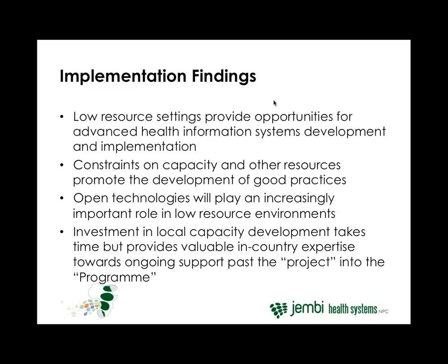And that takes me to my next point, which is investment in local capacity, particularly in the development and the requirements gathering and the architecture of a solution. It does take a little bit more time, but what it does do is provide valuable in-country expertise to reduce the cost of ongoing maintenance and support of the system.